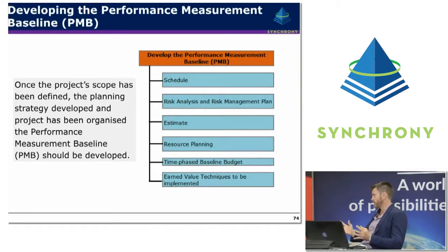And it's really important to do this up front. So the whole idea is that part of the planning process is actually identifying, okay, when we're in execution, how are we actually going to measure these work packages? What do we all agree is a reasonable method for measuring percent complete? And doing that up front, defining that up front, so that it takes some of that subjectivity away.